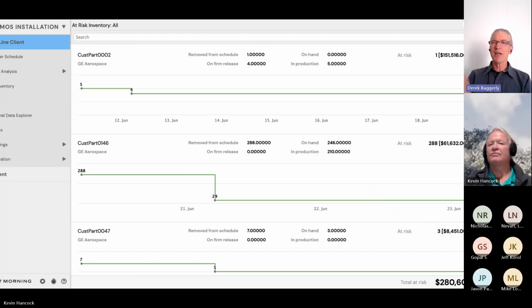Multiply that by whatever multiple your orders typically are, and you have that sort of effect. And what this gives them the tools to do is call up their buyer and say, "Hey, this got pushed out. This is really affecting me." And to Kevin's earlier point, the buyer had no idea that the customer's ERP had done that. And they said, "Oh, well." So it doesn't have to be an adversarial conversation. It's just the sharing of open data saying, "Hey, this moved, we need to talk about it." And they ended up pushing it back in. So boom, 8 months of cash flow for that order right there.